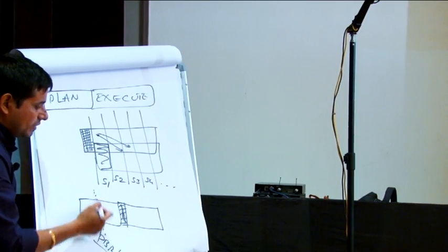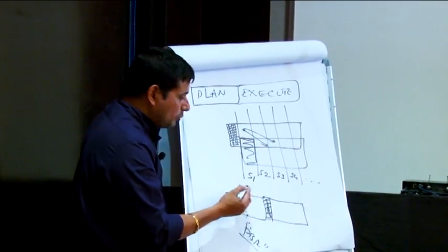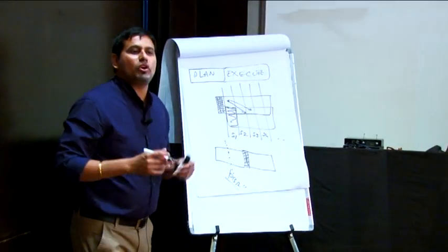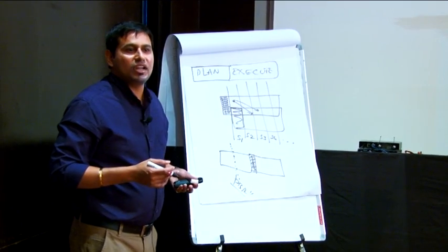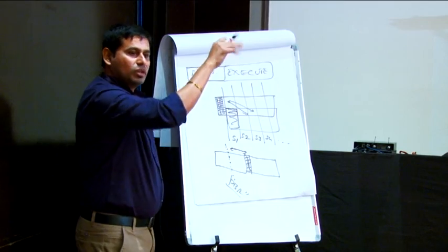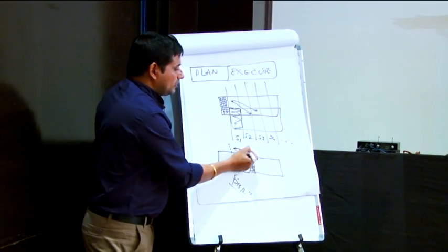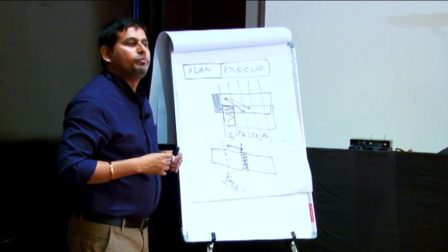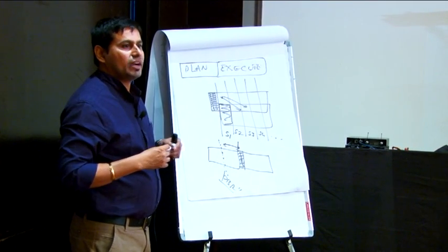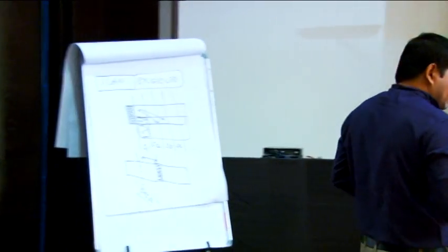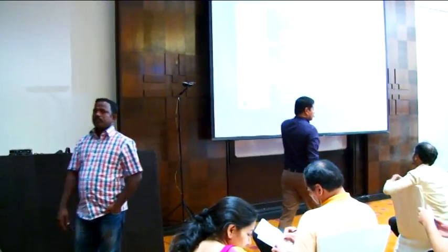Generally we do it in the middle of the sprint because, suppose during product backlog refinement the team has posted many questions to the product owner and he does not know the answers. This time he can use to go back to the customers, do the homework, and come back. By the time you come here, the answers will be available. Right? PBR: product backlog refinement. Good.